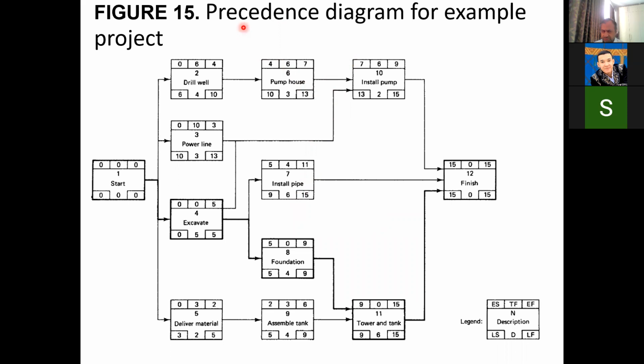So it is a precedence diagram, and of course, a precedence diagram is, in simple words, an activity on node diagram. However, in this precedence diagram, you can see that we can also verify the calculations. So it is the same diagram. That means once we have the activity precedence relationships, you can either create the activity on arrow diagram, or you can create the activity on node diagram.